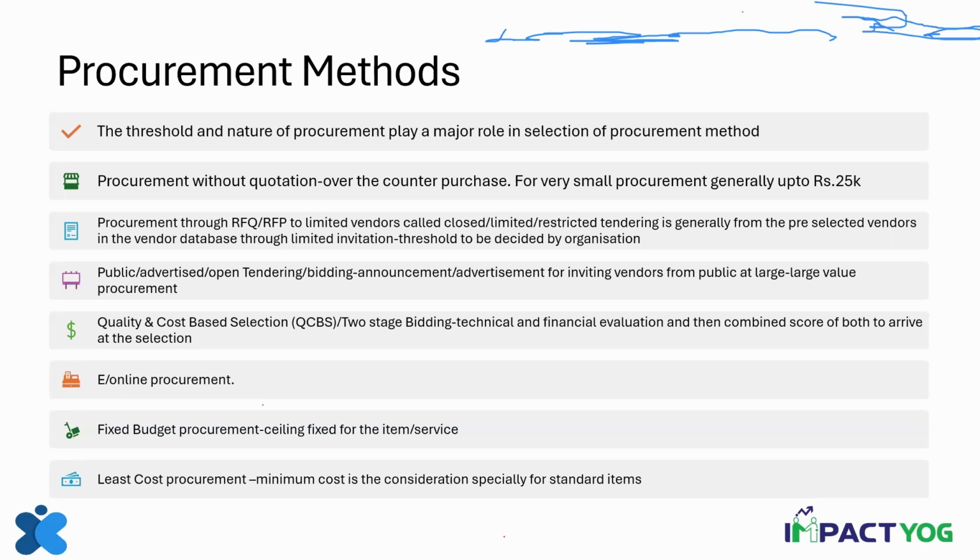That's also possible. Least cost procurement means that for this product, the qualifying idea is to have least cost. Whosoever will give the least cost for this product, generally the L1, but we will say that we will only consider the least cost. So generally for very standard and low value items, we do the LCS, or the least cost method of procurement or selection. Okay, so these are